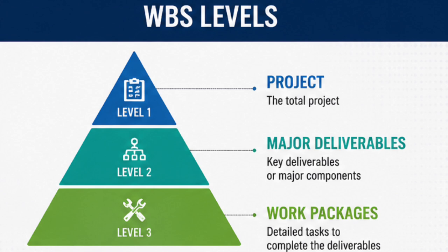Then there could be services. Services is nothing but your subcontractors. Some works will be subcontracted to specialized agencies. So for that also you'll be having this under the services WBS. It is nothing but you need to share the scope of works with that particular party. Then he will be providing his offers. Then there will be the technical part, reviewing the negotiation, for the amount as well as for the schedule. Then you'll be placing the subcontract agreement for those services. So that will come under procurement.